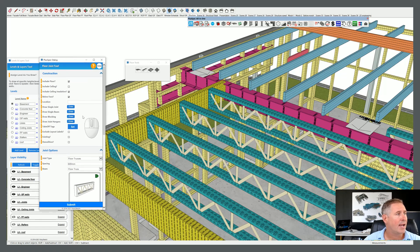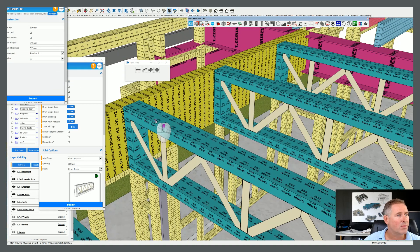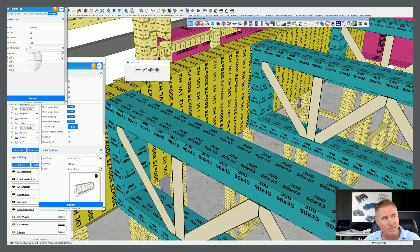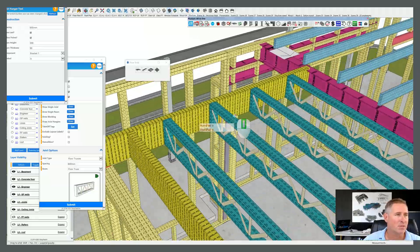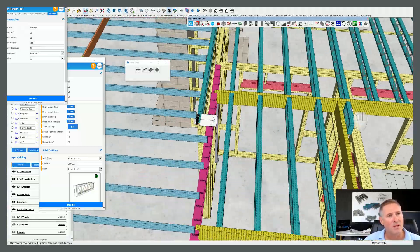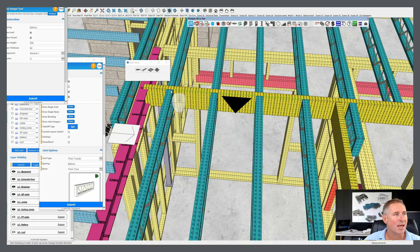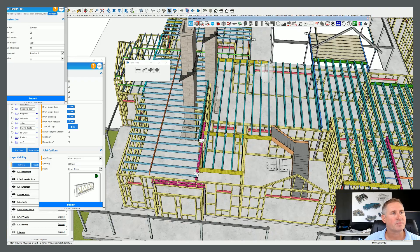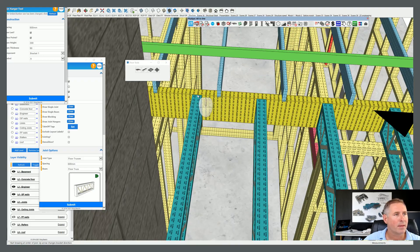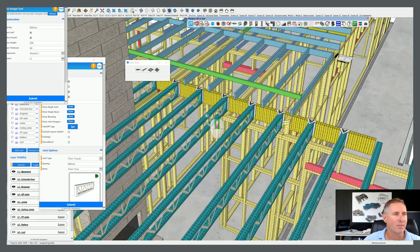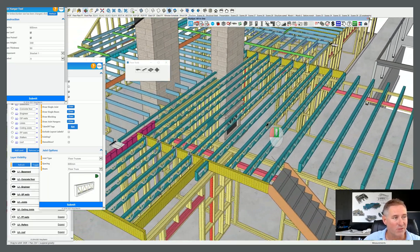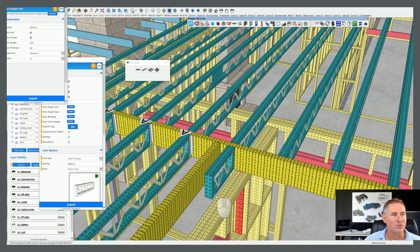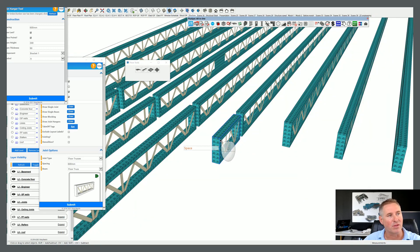Inside of my joist tool I actually have the ability to add in hangers. Instead of just throwing thousands of dollars at hardware as a provisional allowance, it's nice to know exactly how much you have so you order the right stuff. You'll notice inside of my joist I have draw joist hangers. If I zoom in on my joist it tells me the size, so I've got a 300 by 90, so therefore my hanger height is 300 and my thickness is 90. I'm not going to get involved in brands, I'm just going to start putting some hangers in. I need to go from the center of my beam here. You'll notice if I move my mouse around it will change the location of the hangers and which way they go. Usually your floor joists, these are engineered joists, you know they're going to probably specify but sometimes it's nice to know.